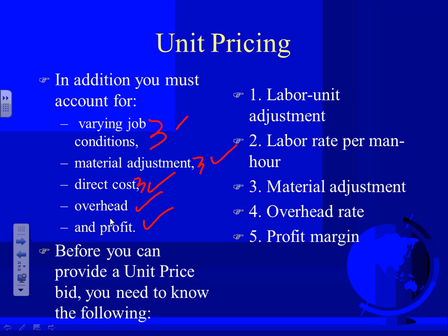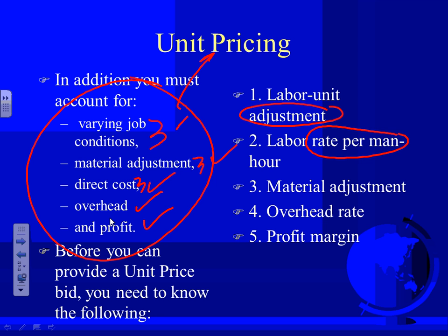You need to know the following. So you are doing a detailed takeoff in order to come up with the unit price. And same thing: don't forget to adjust your labor because of certain conditions, the rate that you're going to pay for your labor, the material adjustment because of theft or whatever, overhead and profit.